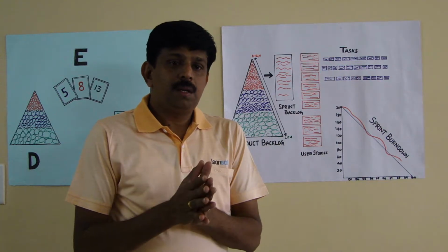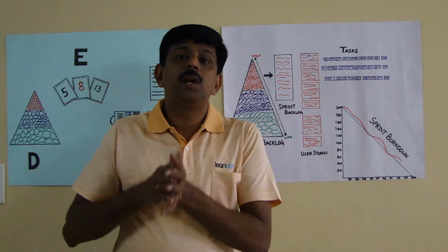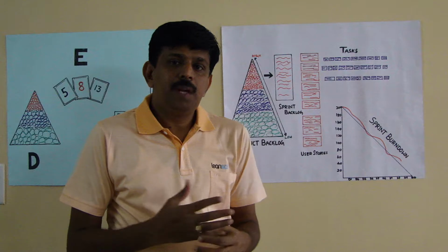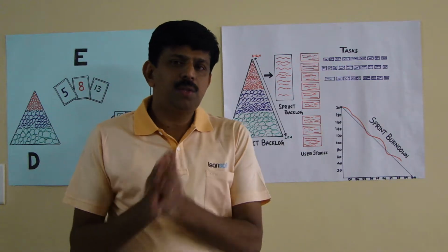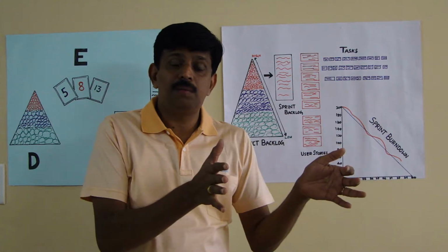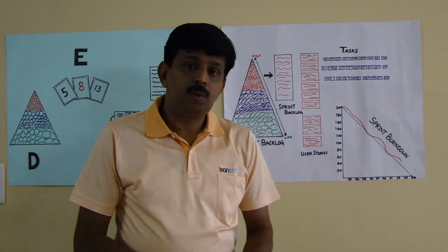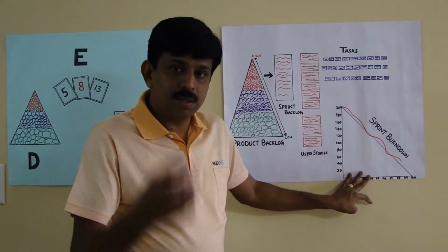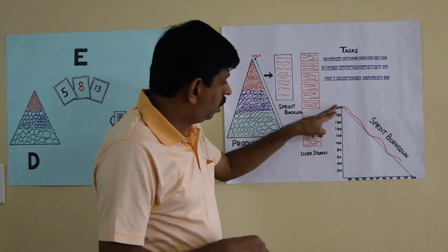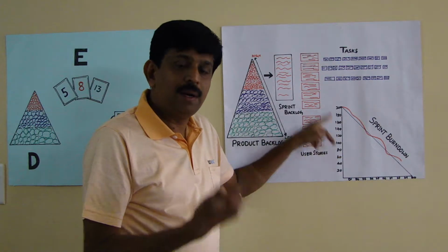The problem with that is we always look at what is done and not really what is yet to be done. Right? The challenge is we think we are done with 80%. There are a few critical defects during testing which actually will give you the status that we are not at 80%, we are actually done only 50%. But we get to know that very late. Yeah? How do we measure that through burn down? The burn down measures not what is done, burn down measures what is yet to be done. Right? Let's assume that 200 hours in 10 days, we have to burn 20 hours every day. Only then we are on track.